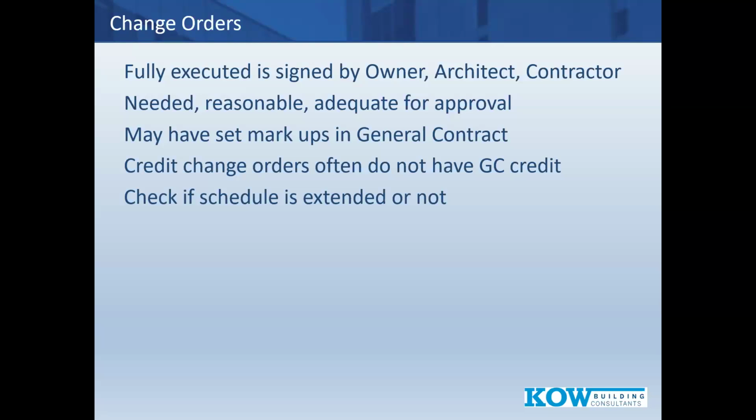So something to look for right in your change order, there'll be a number of calendar days extending the contract time. Keep an eye on it if it's something in the critical path that may be utilized and they've just legally bound, put to paper a delay because of a change order.